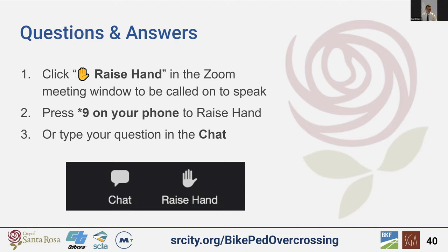Thanks, Stephen, for bringing up that point on potential impacts because of pile driving. I was also going to add that the environmental document identifies that if that was a construction method we were going to be using, I believe one of the mitigation measures is to perform an assessment before and after the activity to ensure there was no damage caused to surrounding structures. Any one of the panelists or project team, feel free to correct me if I'm wrong there, but I do believe that was part of the environmental document.